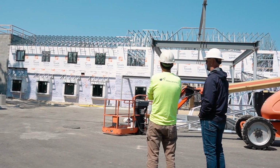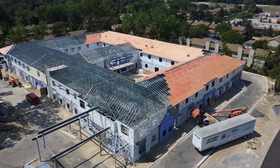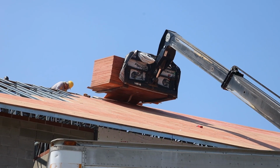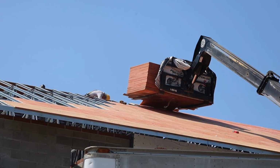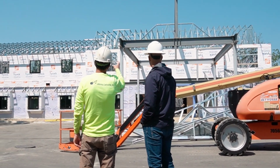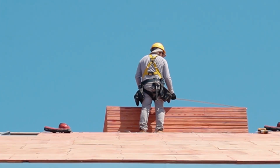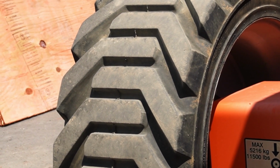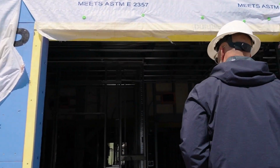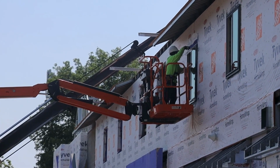What I would suggest is that they don't continue sheeting until one side is done. You know what I mean? Get that side done. That's my suggestion. Then I can roof it all and be done with that section. My guys will do literally 100 square in a day. Right. Ice and water shield, synthetic, everything, 100 square in a day. I just don't want this sitting up there for a long time. Then you're at risk, if the shingles get warm on the stack, they could start sliding a little bit. So if we could get all that done, then we'd be looking at something to roof. Yep, I agree. Okay.